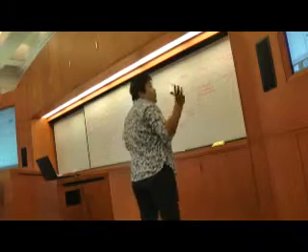You look at the goal, overall objective, the purpose, the outputs, the activities. If you want to plunk in those things, a purpose will correspond to the outcome here, and some kind of outputs and inputs might be your activities. That's a way to think about how to frame it.